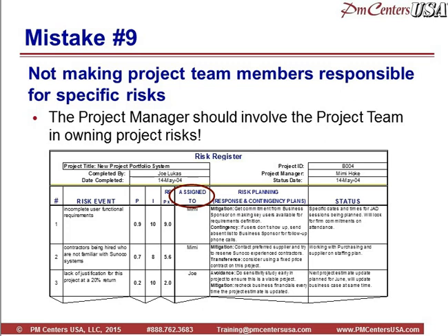If you're the project manager, you should say, hey, this risk is tied to the technical solution. George, you're in charge of the technical team. I think you should own this risk. Do you agree? You always ask that question, do you agree? If the guy says no, why not? Let's talk about it. But your role as project manager is to manage the risk on the project working with your project team. So involve your project team. They should own the risks that apply to them. That's the point. Make them responsible.